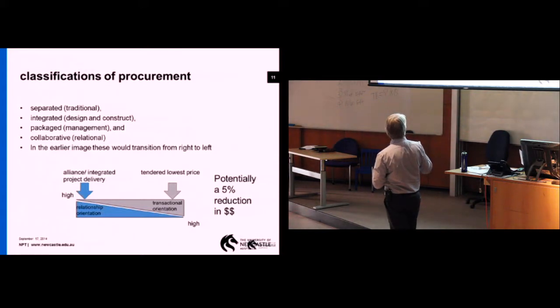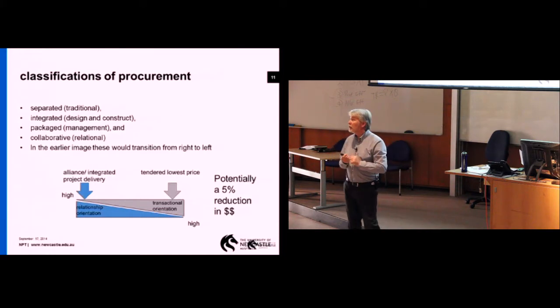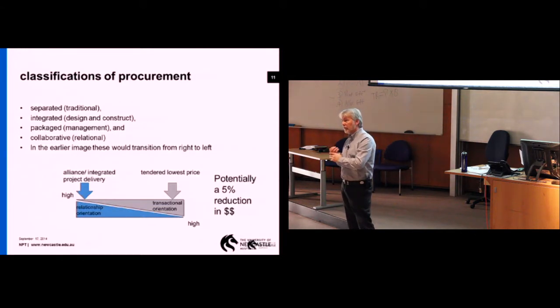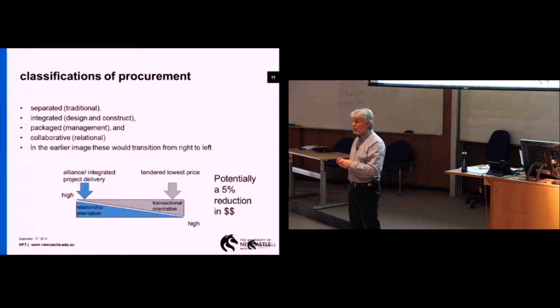Now research tells us that, in some instances, you can look at a 5% reduction in the price or the delivery cost, the target outturn cost of a project, if you utilize the right procurement. The general figure you can look at is 5%. Of course that may increase significantly, it may be slightly less. So it is important, and it's worthwhile. When you think about productivity, you think about the gross national product, you think about the affordability of infrastructure, you think about billion dollar mega projects, it can make an enormous difference to the outcome from a societal basis and from an organizational perspective.